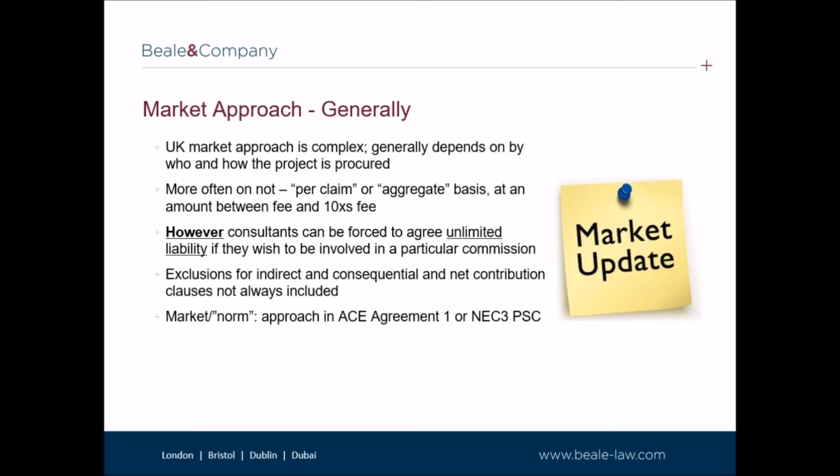As mentioned by Will, more often than not, liability is limited to a given financial amount on a per claim or an aggregate basis, although there are some circumstances where consultants are forced to sign an appointment with unlimited liability if they wish to be involved in a particular commission. On the majority of projects, the client's form of appointment will be issued to the consultant, usually with an invitation to tender or thereafter for the consultant to accept. These usually do not include limitation and exclusion clauses, and these will need to be negotiated.